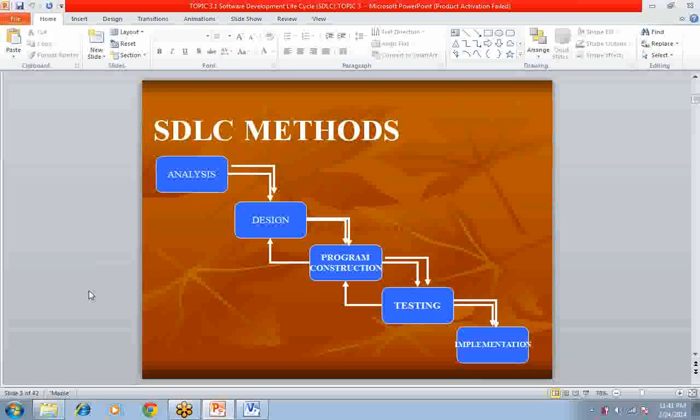Could would be maybe more advertisements added to the Google page. Would be, for example, the client wanting to connect from Google directly to Google Play or YouTube. That is something that can be deferred, say if there isn't enough time, resources or money. We could say we're not going to do it right now, but maybe in the future we could add those features to the program.